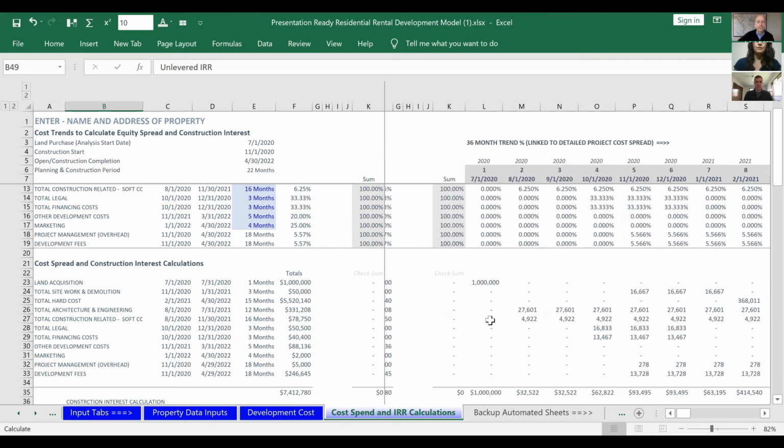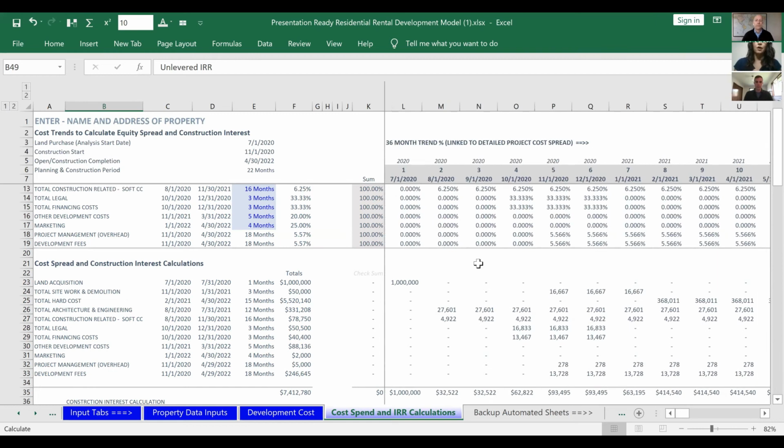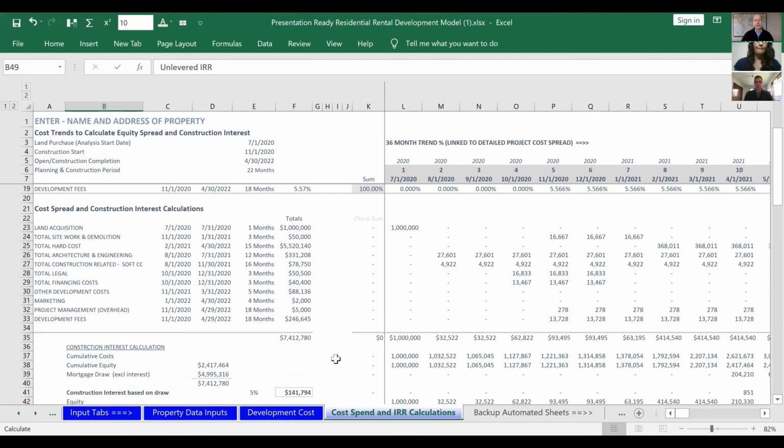That's right. And then as you go forward, you could actually hard code over all of this with your actuals if you really want to see how your cash flow is going. We typically would do it month by month and then just respread it until you get to the end of your project. Well, some lenders require that, right? They require you to update your draw requests so they can see the project cycle as you go. Exactly. Yep.